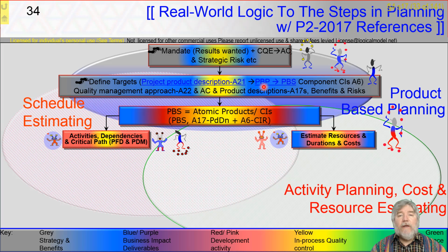And then we need to understand the resources. So I'm on the right hand side of the diagram here. We then need to understand the resources that have that skill set, and at this point we're able to start estimating the amount of work to be done, the amount of resource to be consumed, both in terms of materials but also in terms of people. And if we know the size of our team, then we'll be able to determine duration.